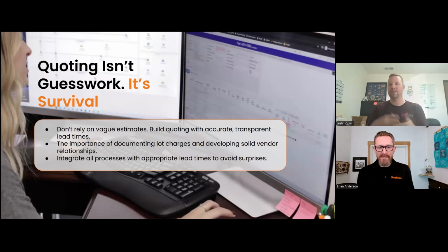If it's 2 days, 3 days, factor that in. One of the things we found, we started going to California for some of our plating a couple years ago with aerospace demands. And it's 3 days. So we would always put 3 days shipping. Well, it's 3 days there and 3 days back, and a day on either end to process. So what we found is anytime we go to California, it's really like a week and a half extra just in transport. Those things really kick your butt on lead times if you don't get them just right.